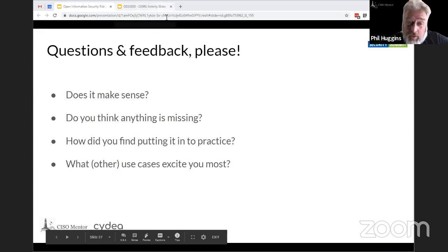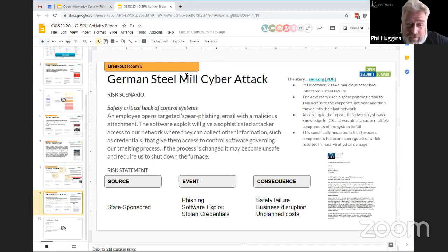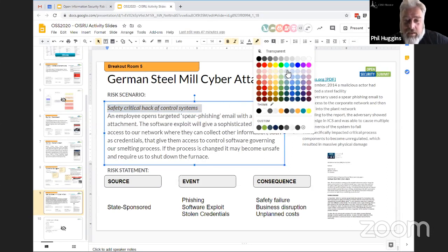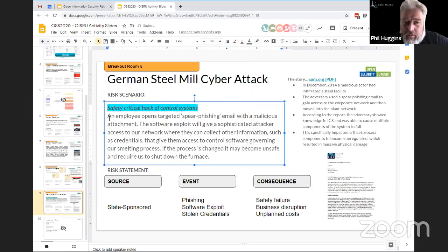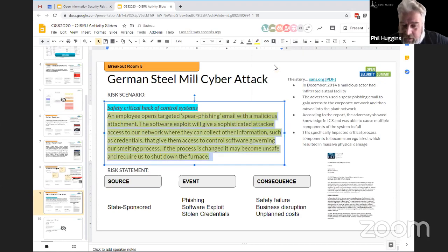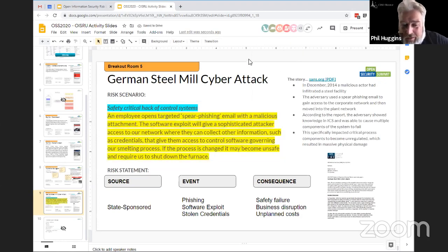You might also want to do the process of looking at several hundred risks and saying to yourself, am I just looking at many instances of the same risk? Is it just the same risk in lots of different places in my scope? The nice thing about using a common, consistent language is that you may well find that you drop down to about 50 risks you really care about. They just happen to have instances all over the place.